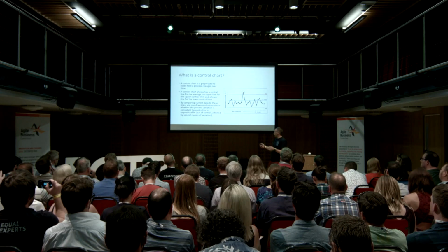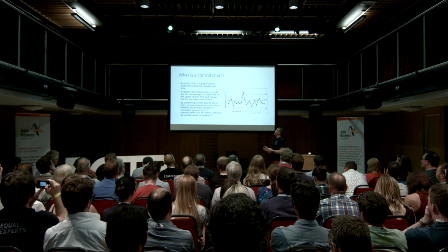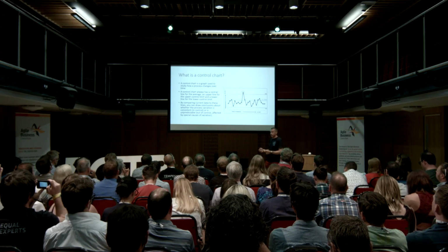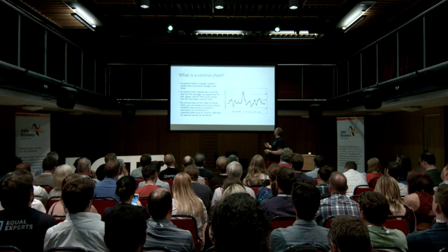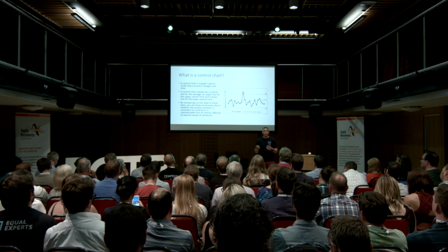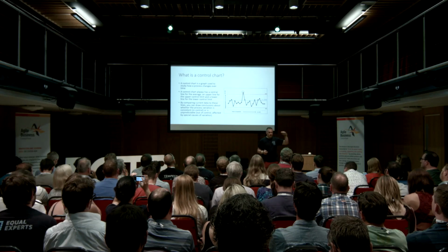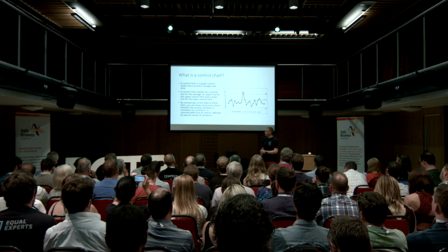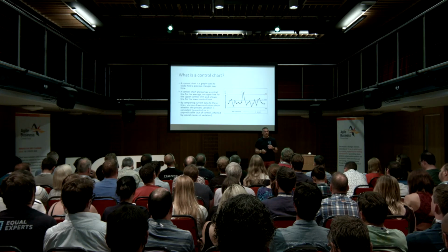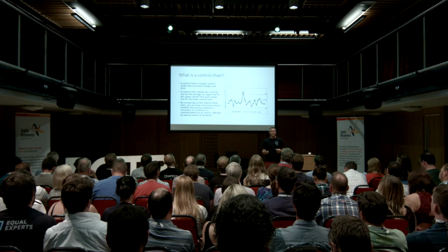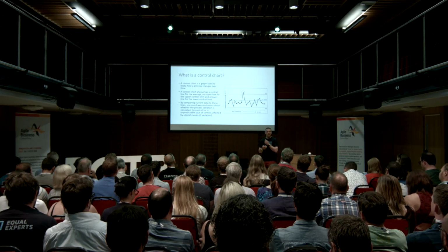The control chart has a few elements. You've got your data, you have a center line, which is your average, and then it always has an upper and a lower control limit, and more often than not it splits that into 1, 2 and 3 levels of control limit. A control limit you can think of a little bit like a standard deviation. The mathematics behind generating it is slightly different, but for the sake of argument today, it's basically like a standard deviation.